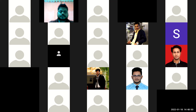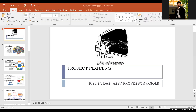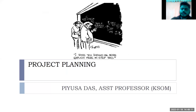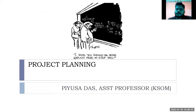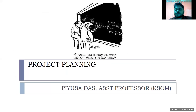One option was taking HR project two and government service project one. The total benefit coming was three thousand plus six thousand — nine thousand. The question is whether anybody got a better number than nine thousand, because net benefit is like your NPV — after deducting your cost everything is out. So which projects will you select? If you are crossing 9,000 while remaining within the constraints, that is the target.